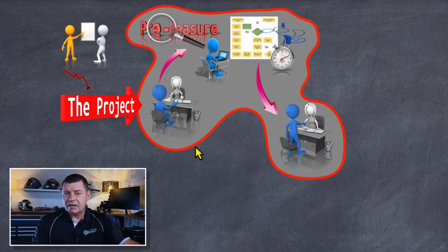And then it's that pre-measuring activity that gives them sufficient information to sit down and plan the project from beginning to end. And I mean right up to the point where you've got an implementation plan around solutions in your hand. What the solutions are, they're not going to come up with, but how they would go about getting to that point, that's what they can plan. So they plan it from beginning to end, and it's that information that they can take back to the next meeting. Now, the thing to add to that is when they're doing the pre-measuring, that phase also involves stakeholder engagement.